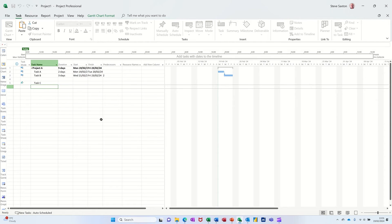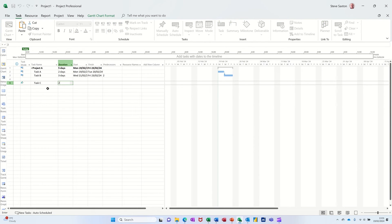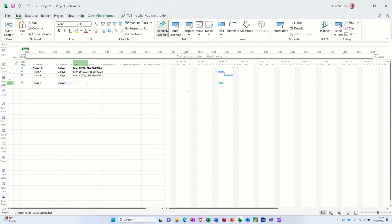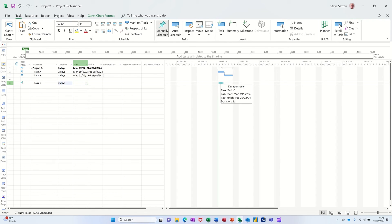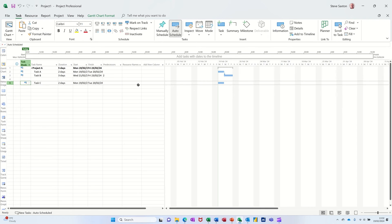what you don't get is all this information - start, finish date and you don't get an indicator on there. If I put a duration of two days I'll get the indicator but it's not showing me the dates even though on the Gantt chart it is showing me today's date. If I put this to auto-scheduled it will put the dates in. So that's the difference really.